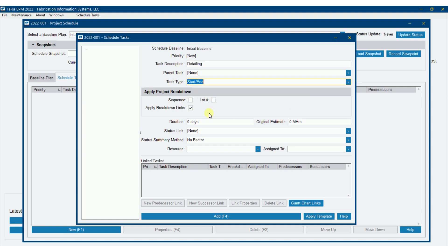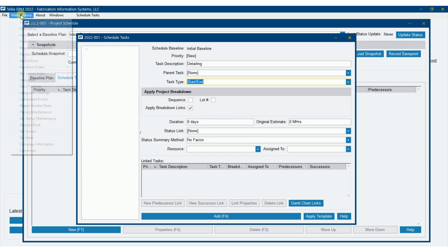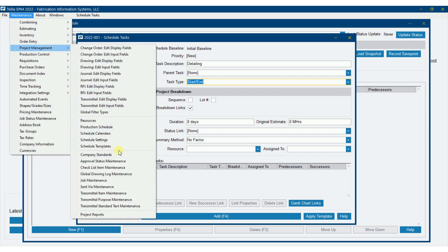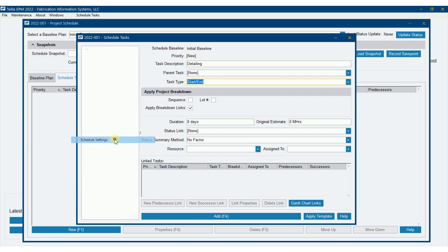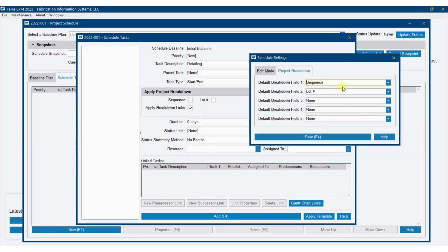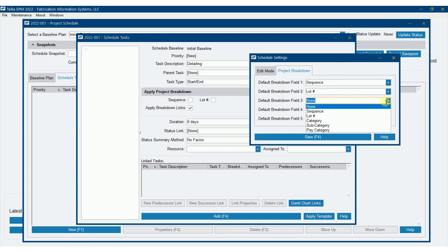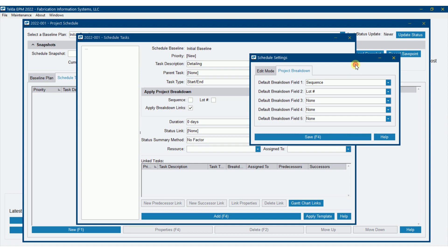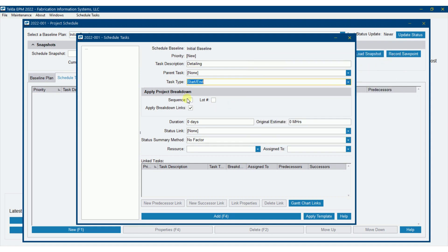Now here we've got options to apply project breakdown. We can break detailing down by, right now I've got it set up for sequence and lot. Now that can be adjusted in schedule settings. So right now I've got it done by sequence and then by lot. Just note that I could have more options here. I could go down to category, subcategory if I wanted to, pay category. So right now I have it set up for sequence and lot and that's the way we'll run it right now. So I'm going to say, yeah, let's do breakdown detailing by sequence and lot.